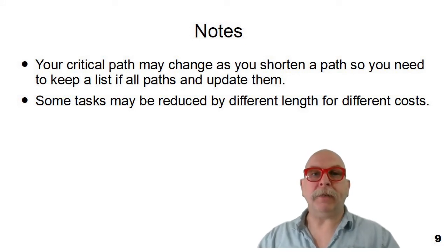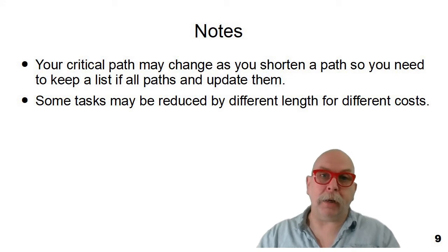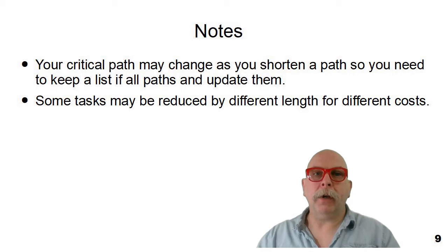Maybe you've got a piece of equipment that you need to rent, and you can crash the project by a week for renting it for this much, but you can crash it by 2 weeks for renting it for a longer period of time. So you're going to have to play all the different scenarios.